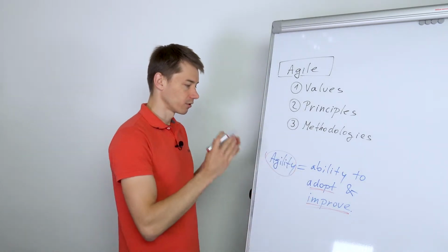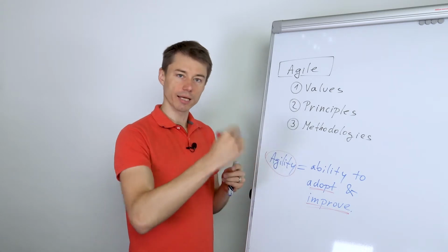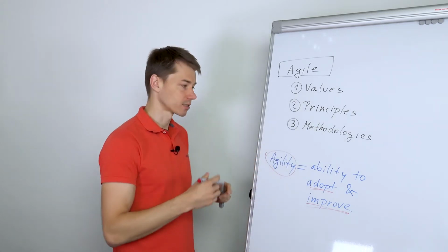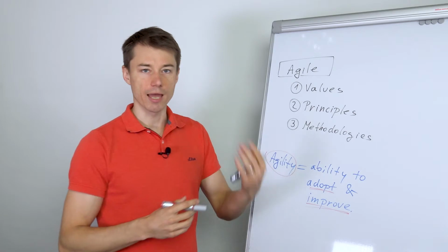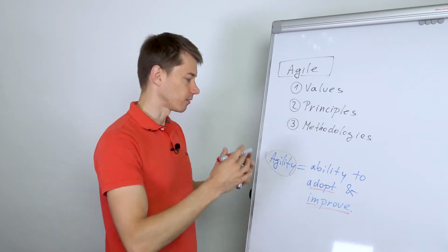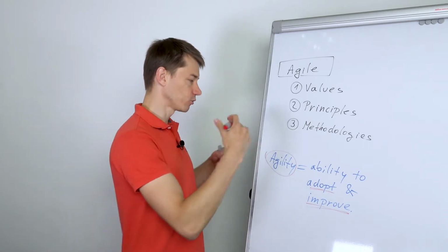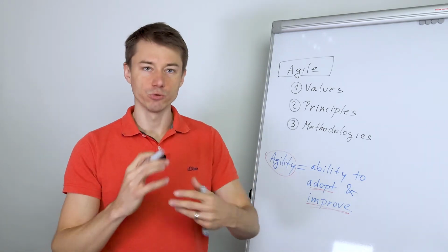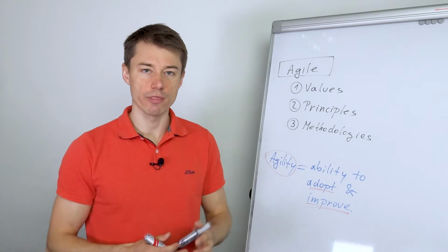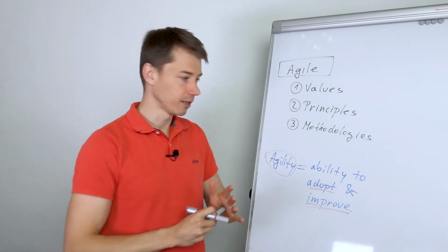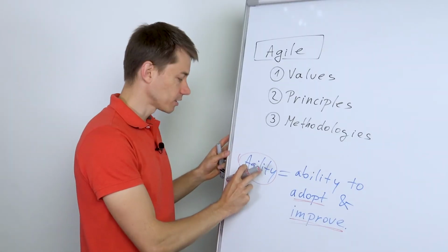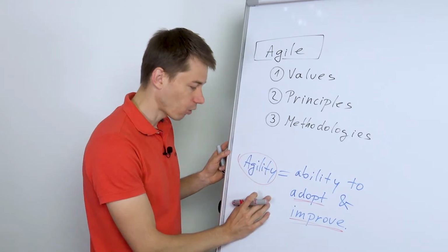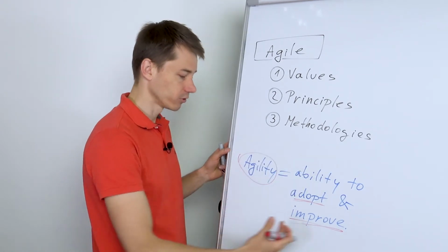So it's no longer just one release in a year, it's a dozen small releases, say one release every 2 weeks. That's agile, because you can talk to a customer, you can adapt, you get feedback, you build on that feedback a new feature maybe, okay? A small feature. So this is where agile comes from. How could we improve continuously?